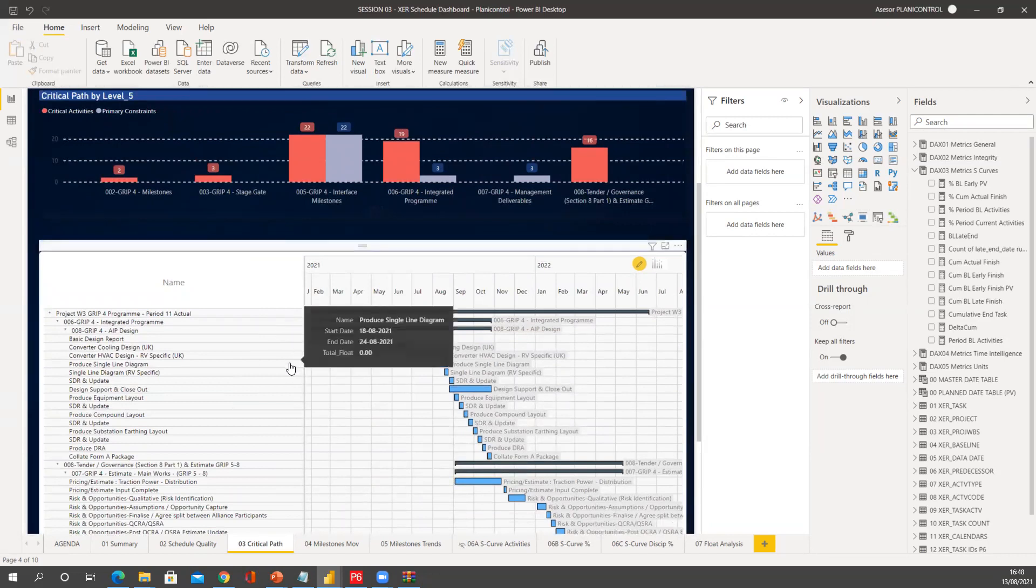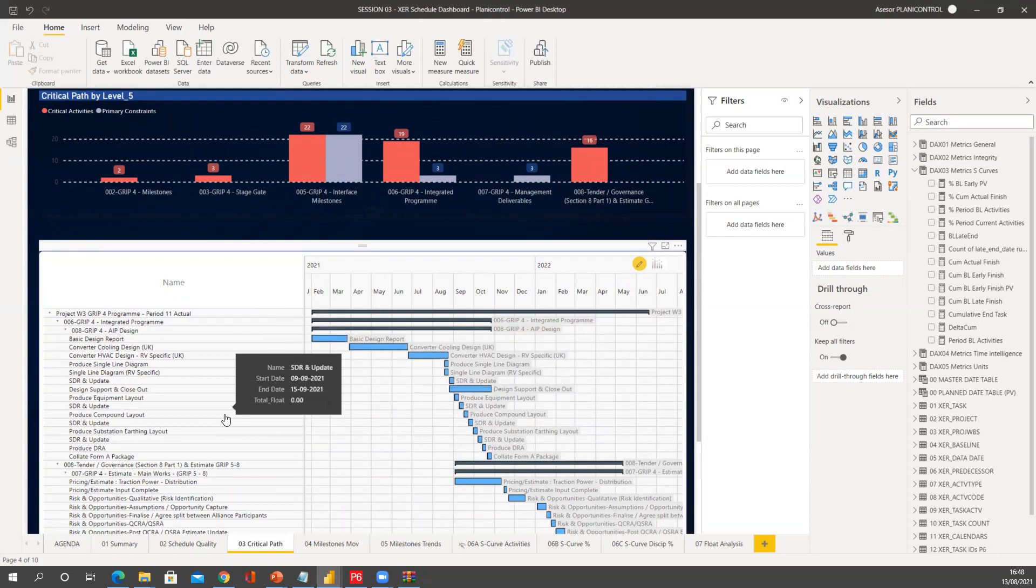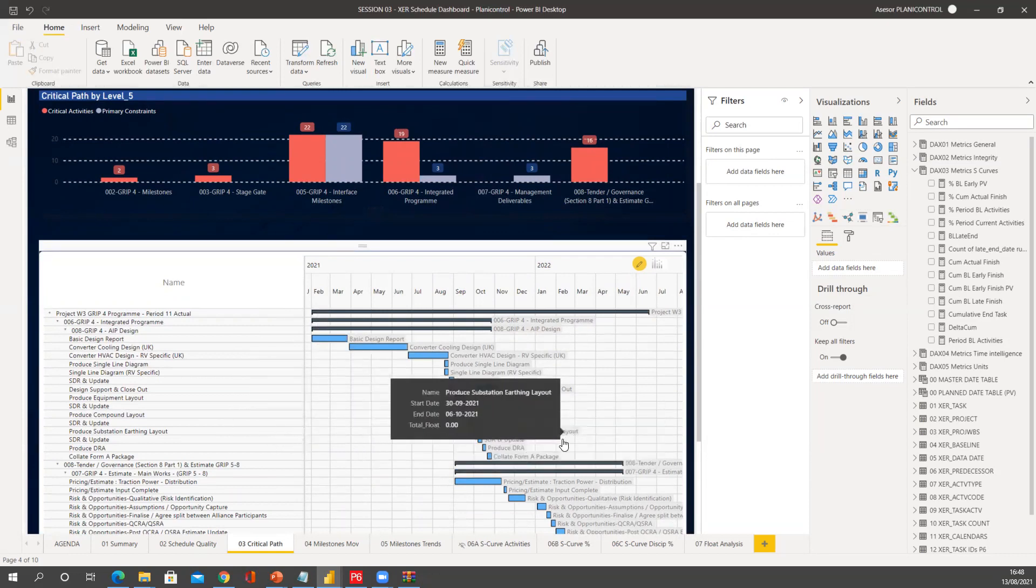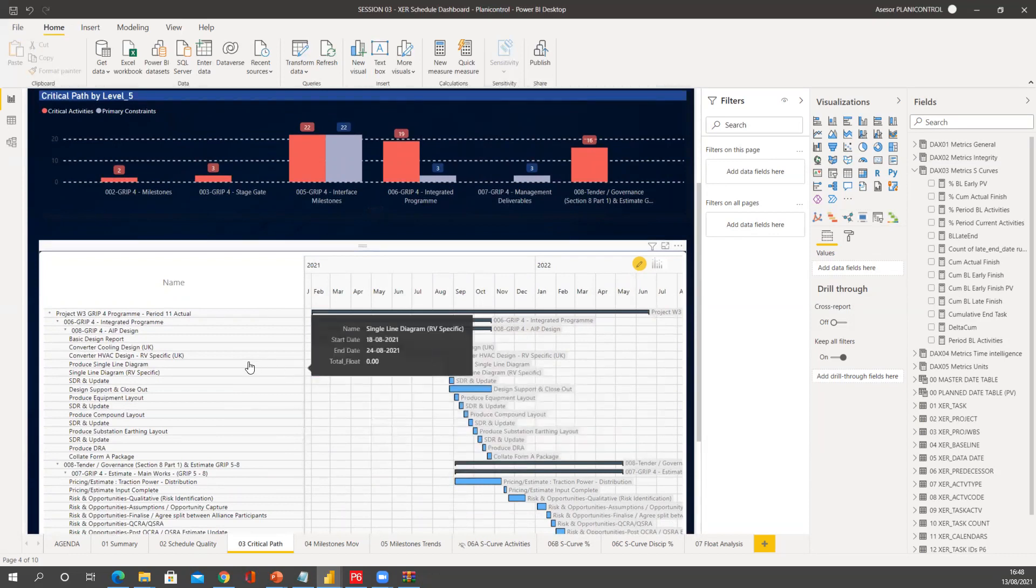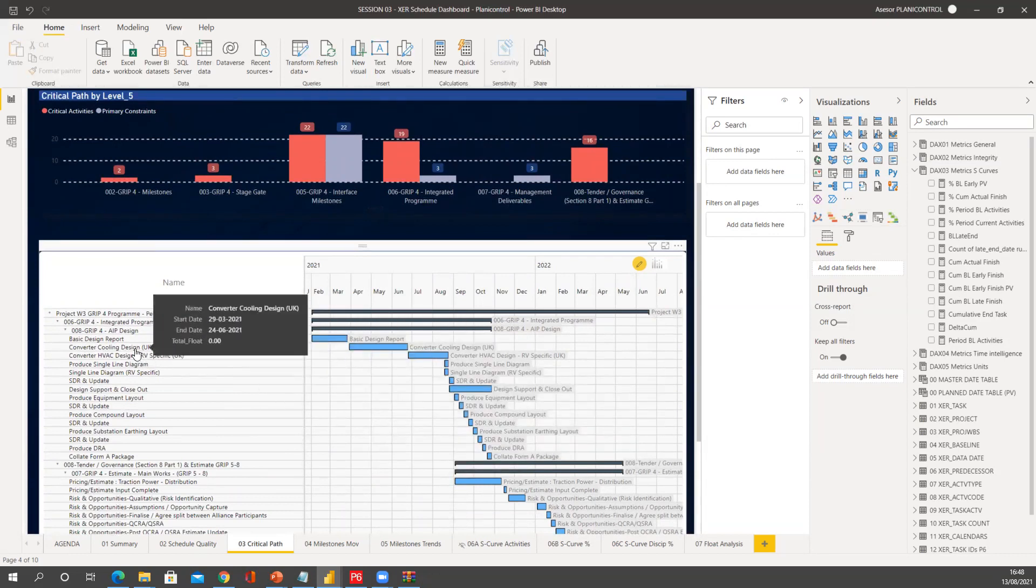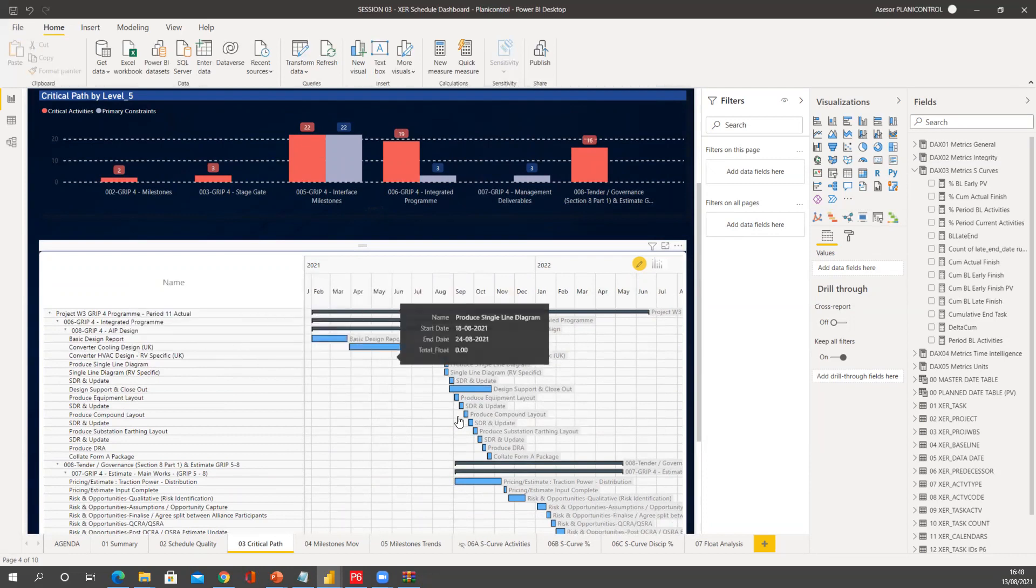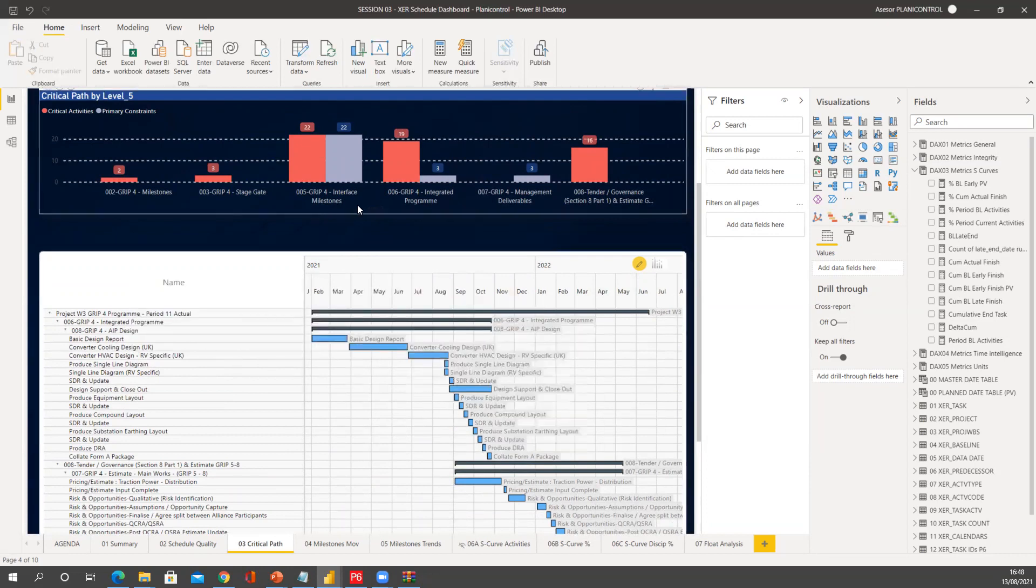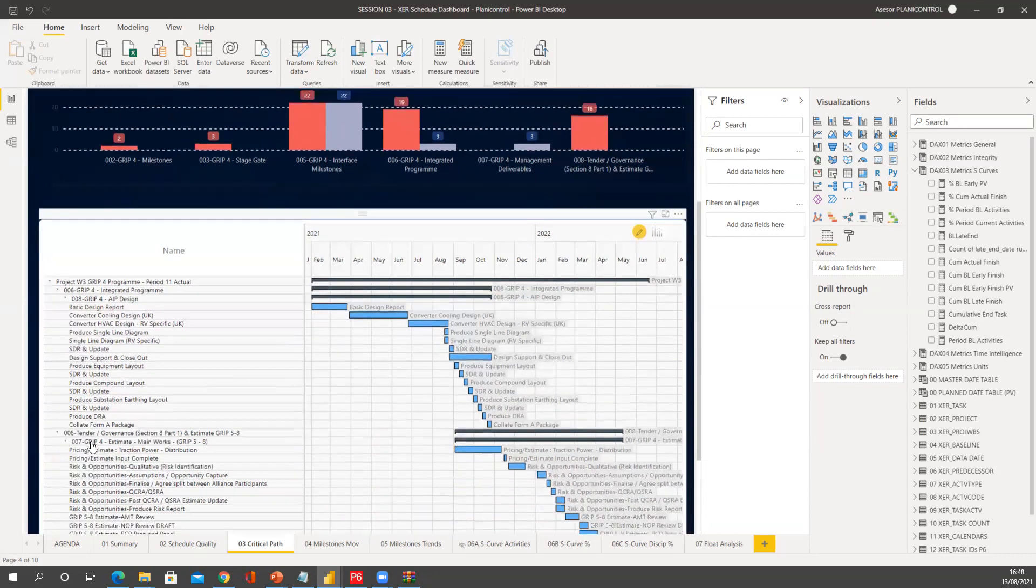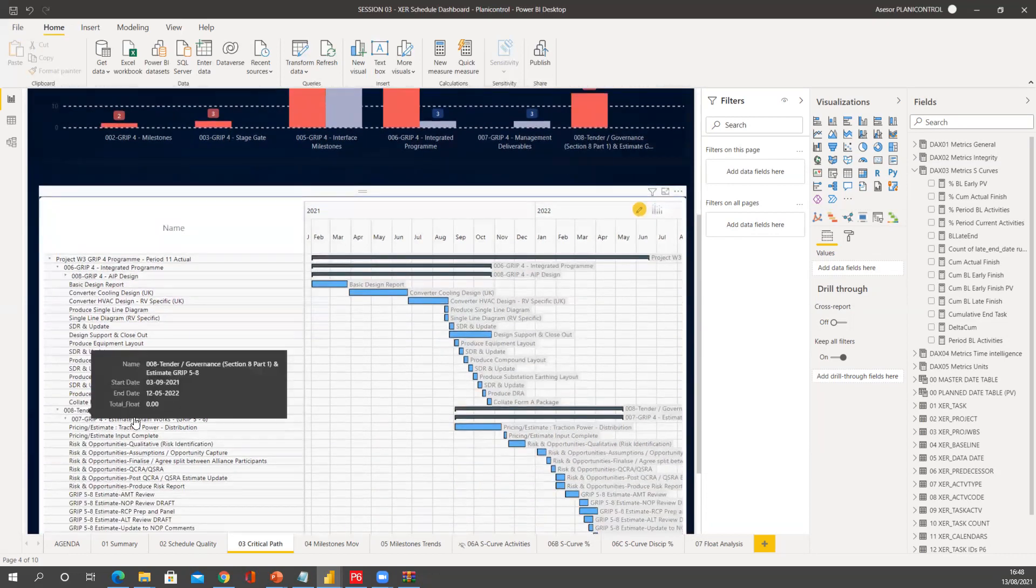It's giving you exactly the same values that you will get from P6 when you filter by critical activities. This is critical activity with zero value float. And then you see AIP design, you have all these activities. It's basically everything that belongs to this WBS. But then you have also 16 activities now in tender. So now if I go see here, it's going to be my 16 activities in tender displayed on the Gantt chart.